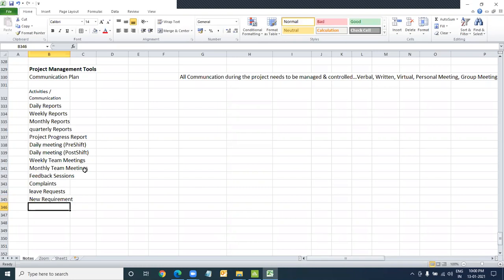We will require, again, there's something called milestones. Milestones are, see, at the end of every phase, when Define gets over, you go through a management review. At the end of the Measure phase, you go through a management review. At the end of every phase, you sit through a management review. That's a communication that needs to be done.